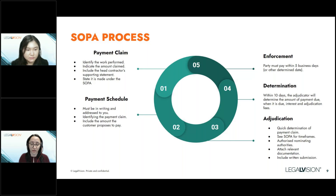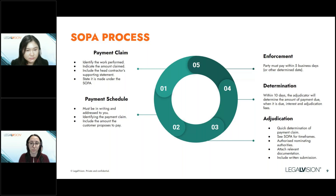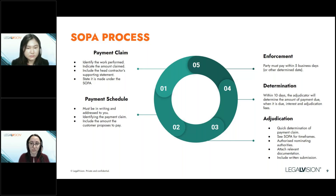The last and most important point is that a valid payment claim must state that it is made under the Act — as simple as including a sentence saying this is a payment claim made under the relevant security of payment legislation. Additionally, if a head contractor is making a payment claim, it needs to be accompanied by a supporting statement. Penalties apply if the supporting statement isn't provided, but it doesn't necessarily mean the payment claim is invalid. A supporting statement is an approved Fair Trading form in which the head contractor declares that to the best of their knowledge and belief, they've paid all subcontractors all amounts due and payable in relation to the construction work.